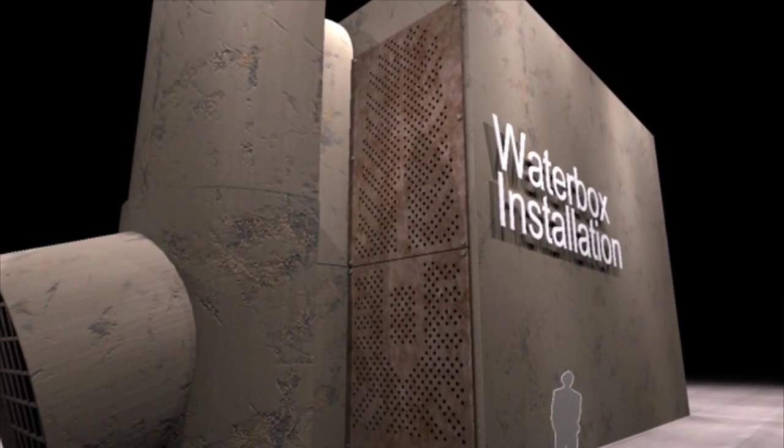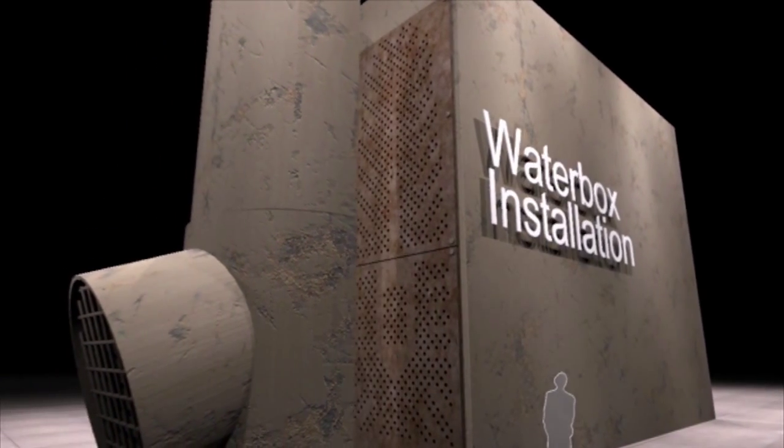Next step is to hydro test. When you hydro test, you fill the condenser with water to at least a foot above the tubes. And you typically bring it up slow. So if you find a leak, you roll it as you're working your way up. And then, of course, the water box is put back on before we would do the test also.